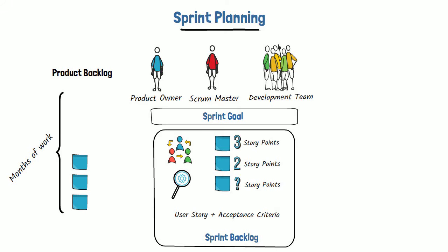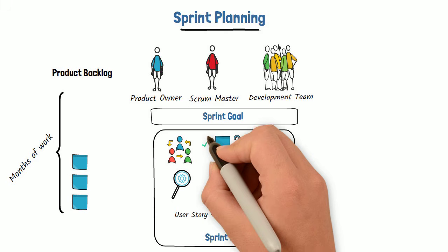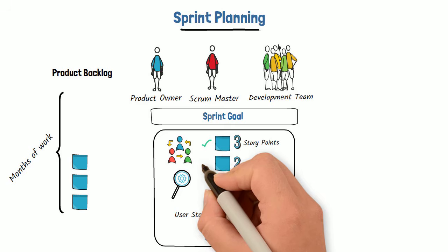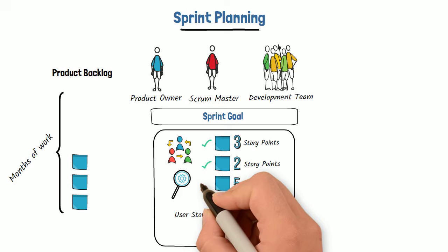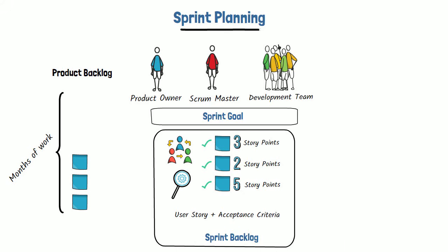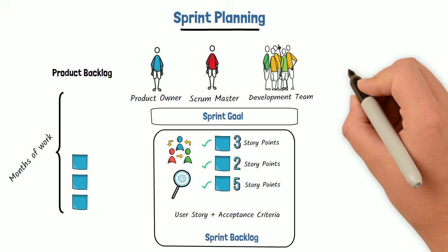This process repeats until the development team has enough user stories to fill a sprint backlog, and no more than they can complete within the sprint while working at a sustainable pace. The sprint allocation of user stories doesn't need to be perfect, but the development team will get better in time with planning how many user stories they should commit to in the sprint planning.